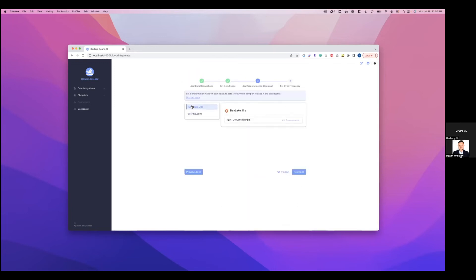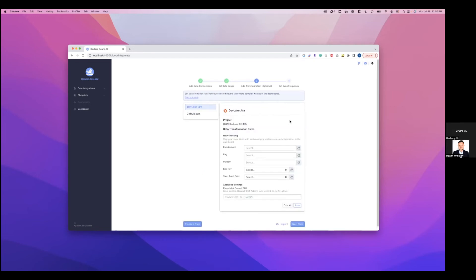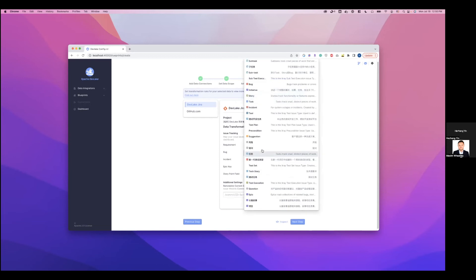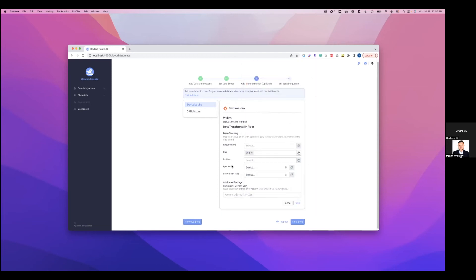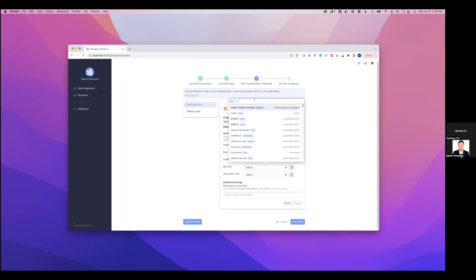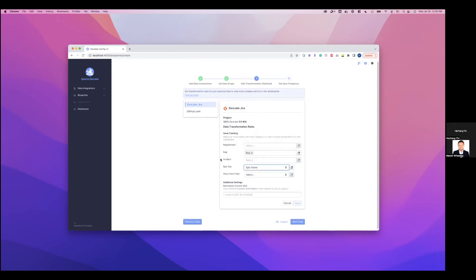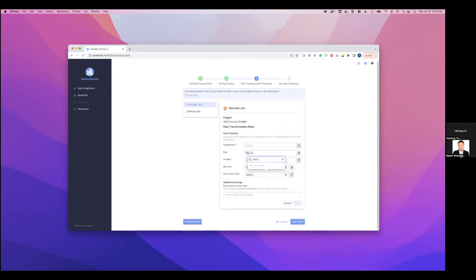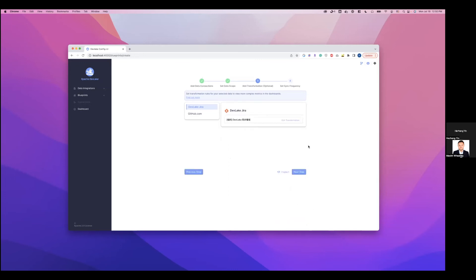And then for Jira, we also have some transformation rules we can set up. Let's say set up the bug. And then also tell DevLake which custom field corresponds to epic, which custom fields correspond to story point. And then save this setting as well. And the next step.